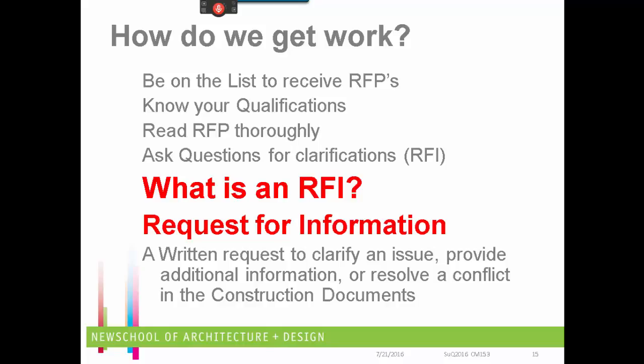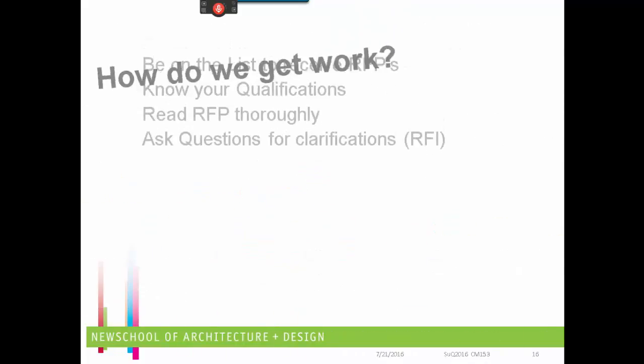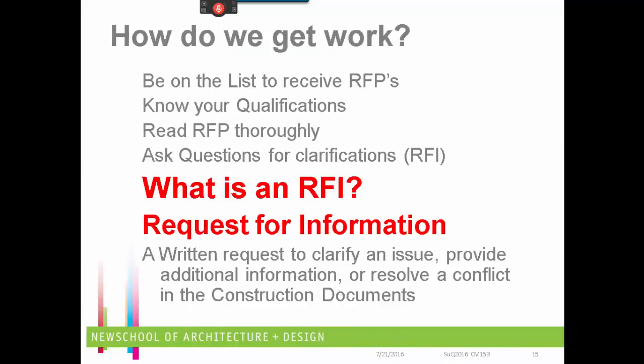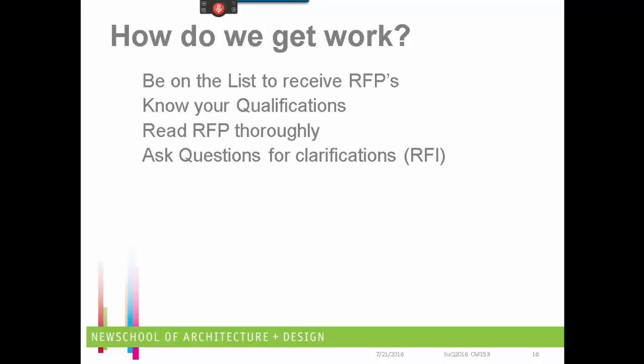So once we've got our clarifications, we need to assemble accurate quantities and the costs for materials. We need to be able to discover and apply the local labor productivity factors. And this is a really important element because different areas of the country do different quantities of work at different times. In the market where I did a great deal of work, which was in Chicago, we based masonry walls, concrete block walls, on 300 units per day per mason. So a crew of 4 masons and a laborer could do about 1,200 blocks a day.